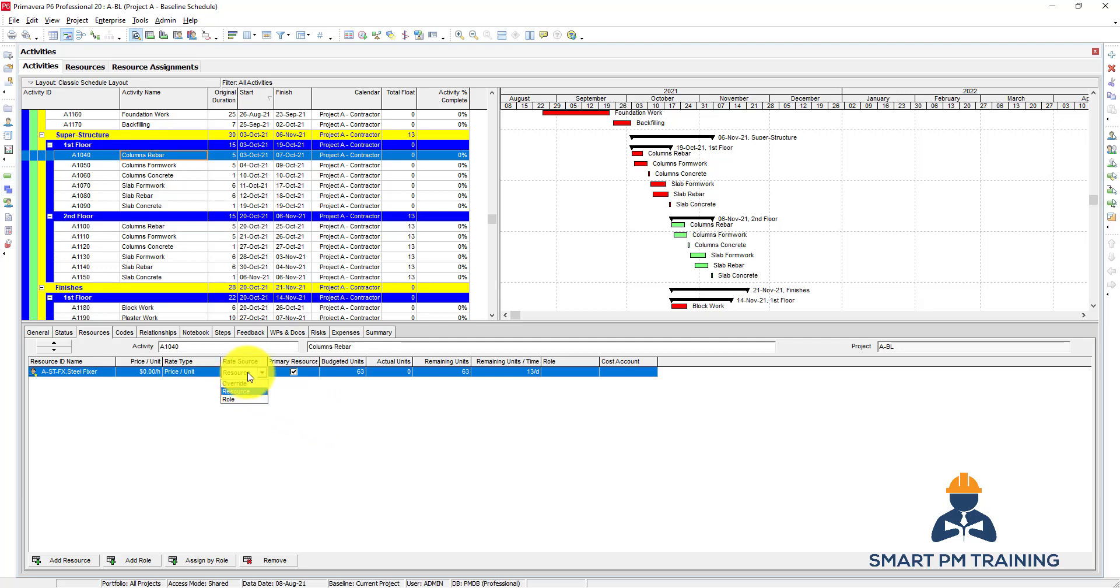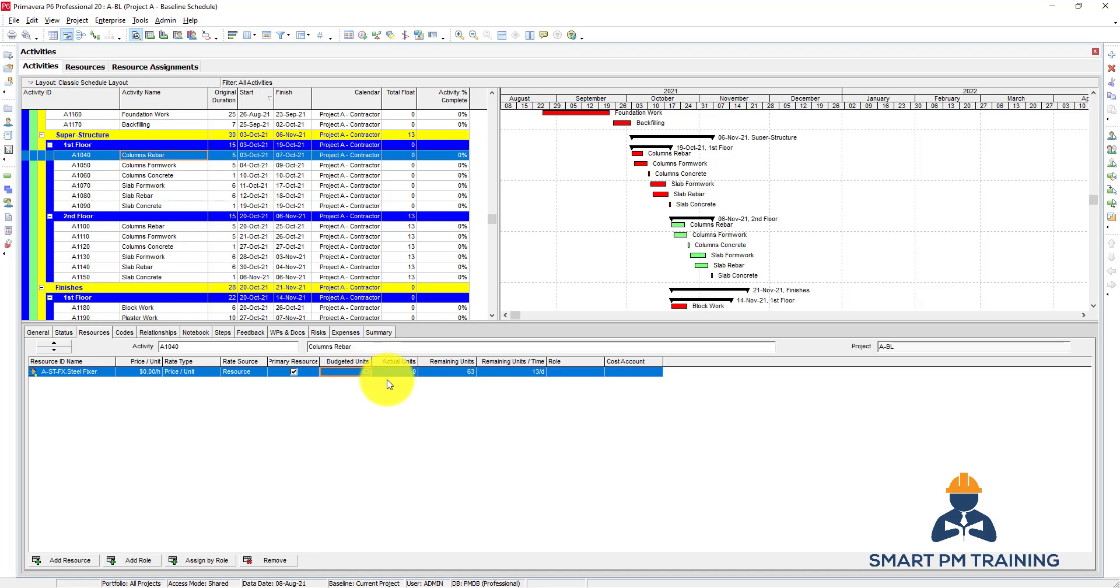Data source is resource, we'll keep it resource. This is a primary source also. Budgeted units - this is the most important part and it has to be done very accurately because it changes everything. Everything on resources is based on the budgeted units. In case of labors, it's budgeted hours. If I am having materials, it's budgeted units.